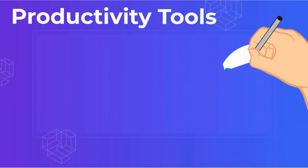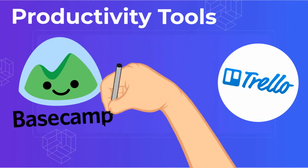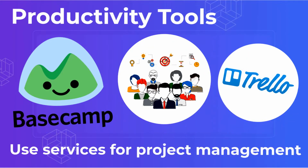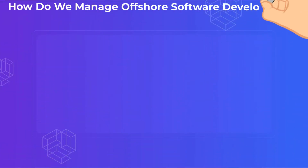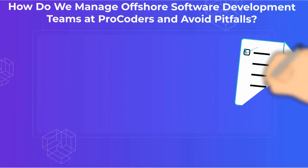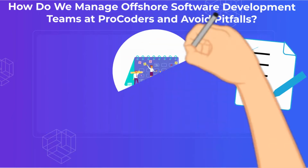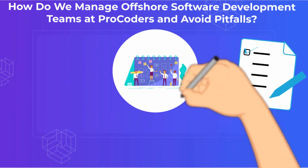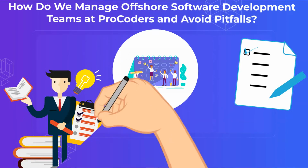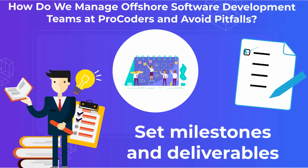Productivity tools. If you want to know how to manage an offshore software development team, start with productivity tools like Trello, Asana, Jira, and Basecamp to put all your project materials in one place. How do we manage offshore software development teams at ProCoders and avoid pitfalls? Set milestones and deliverables. It's the foundation of offshore development management. Of course, expect to have a hand in the schedule, especially where it impacts your internal teams. Ideally, you should have enough research so the schedule is set with clear milestones and deliverables before work begins.